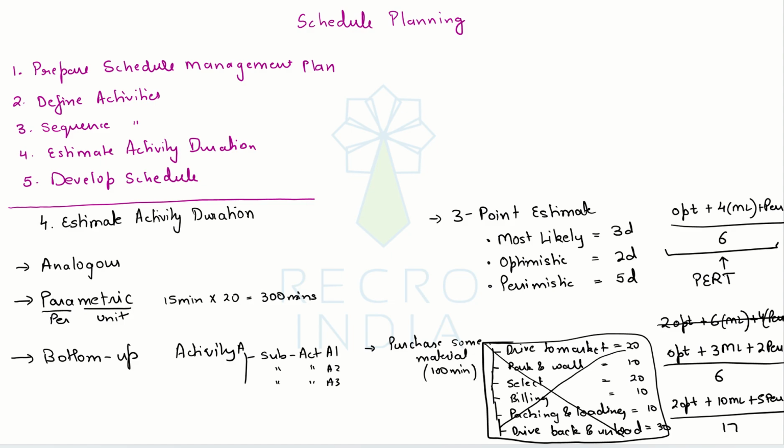But remember that the fundamental is that you have to distribute the weights according to the scenario, and then while dividing you have to make sure that you are taking the total of the weights and then you divide with that number. And if you use this particular expression, then of course that is coming from PERT. So whichever method, whichever technique you feel is appropriate, fine, you can use that. I have given you the advantages, the disadvantages of all of them.